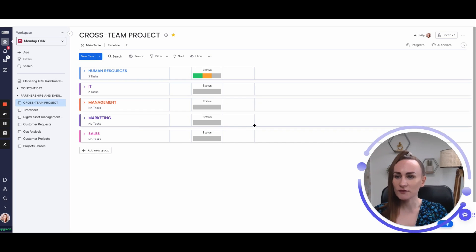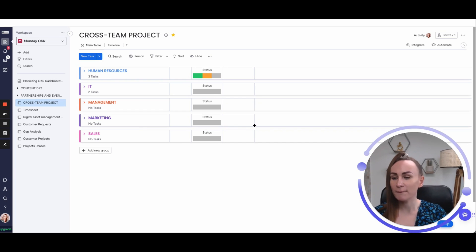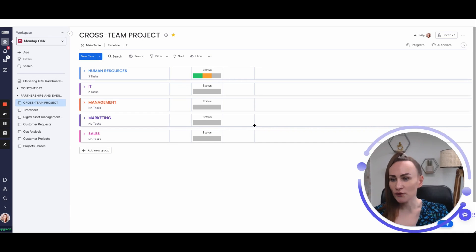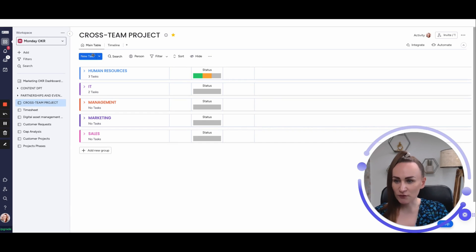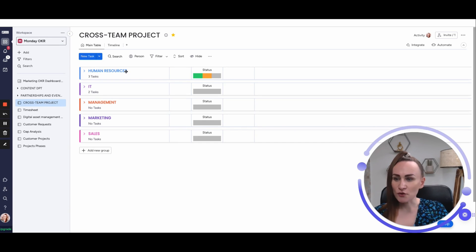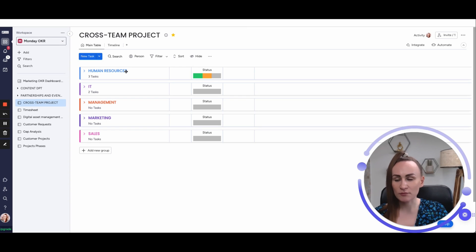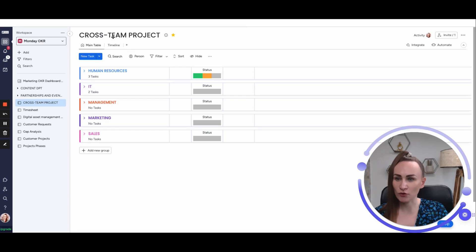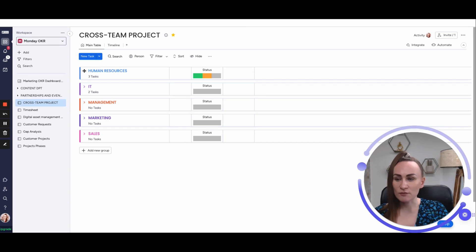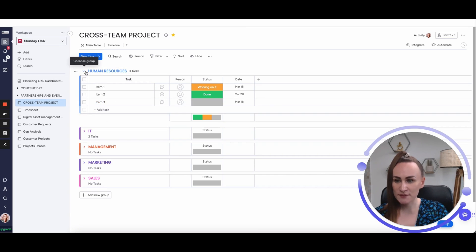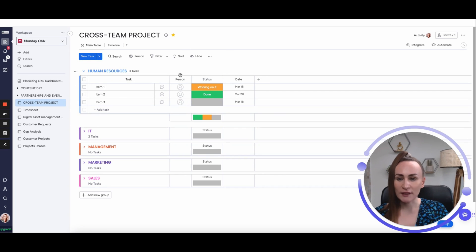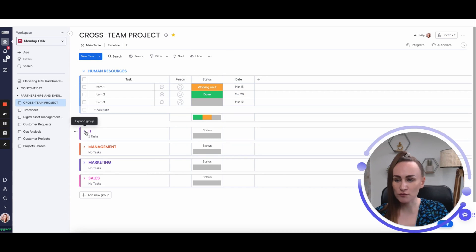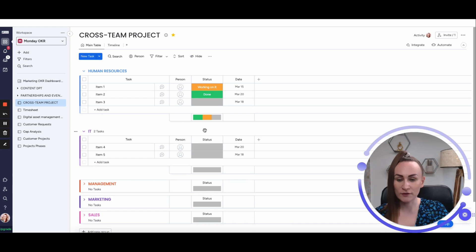One interesting approach to Monday groups is to have groups based on the departments. This applies only to very simple cross-team or cross-departmental projects. The reason is, once you collapse your groups, you cannot have different columns for different groups.